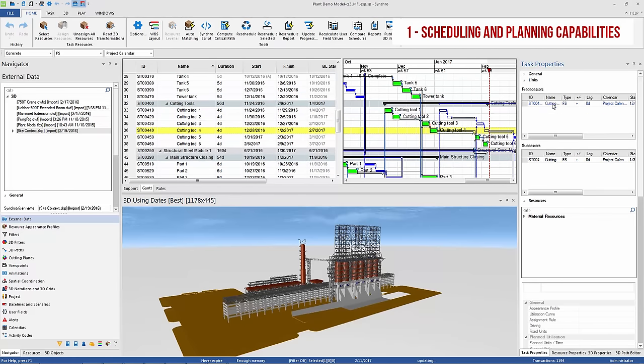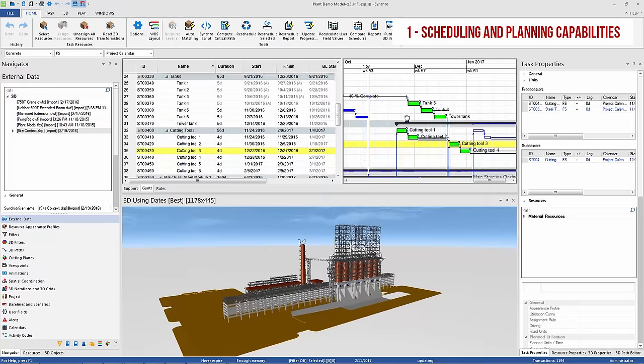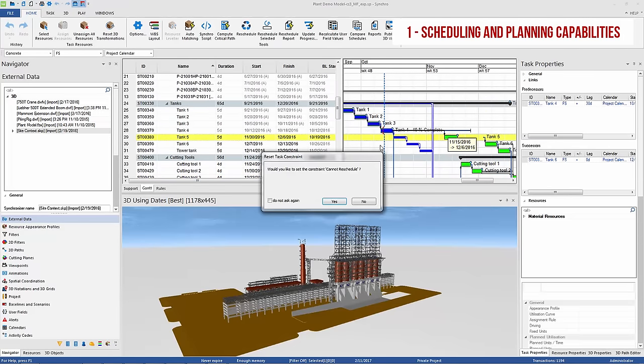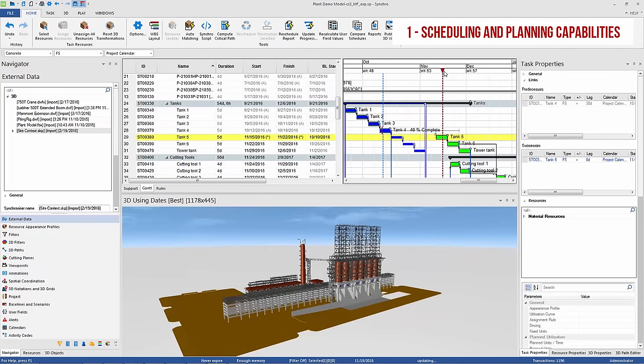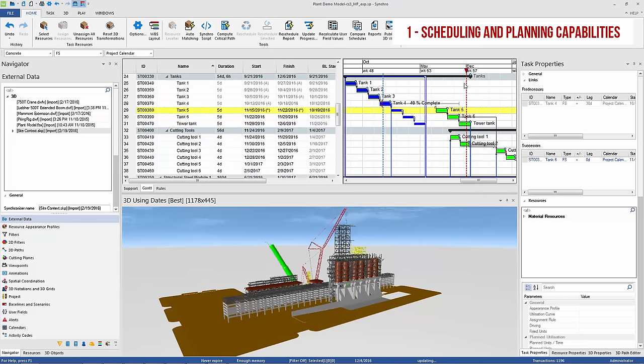This means that whether you're importing, then detailing or optimizing a schedule, or just creating your own work plan within Synchro, you can use the interactivity dependencies, constraints, and logic relations to quickly evaluate the effect of small changes on the entire project.